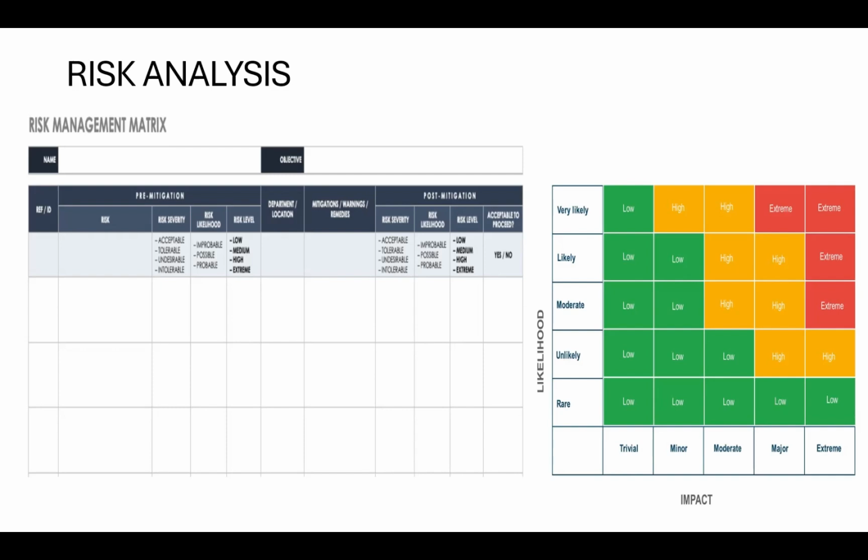What is the mitigation? We say all our data will be backed up in the cloud. That is the mitigation, so that risk is reduced. So in project management, you look at the risk holistically and say this will be the mitigation. That is what we do in terms of risk analysis or risk management in project management.